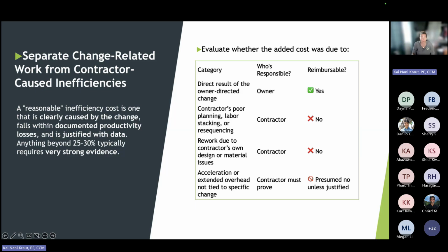had this with Wahiwa where initially, when you looked at the work that the contractor did under conditions that were not change conditions, they got 2 guys out there with a piece of equipment. If you look at them under their change condition, they have 3 guys managing 5 guys with 10 pieces of equipment. When we document those differences, that becomes the evidence that they are stacking labor and equipment on the change. We don't have to pay for that.